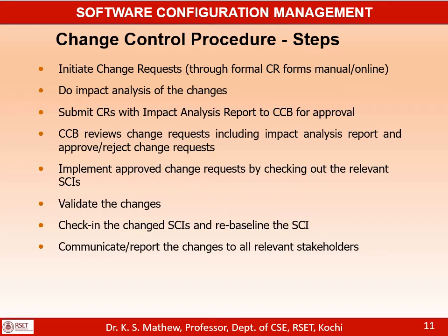Any change required in any of the work products or during the project has to be formally requested as a change request, and it can be requested by any stakeholder in the project. It could be initiated by a team member, a customer, an end user, the project manager, an architect, or any stakeholder in the project. But if it needs a change, it has to be formally requested through a formal change request.